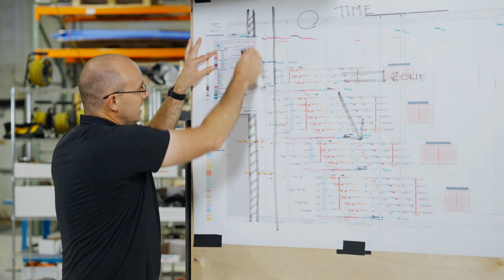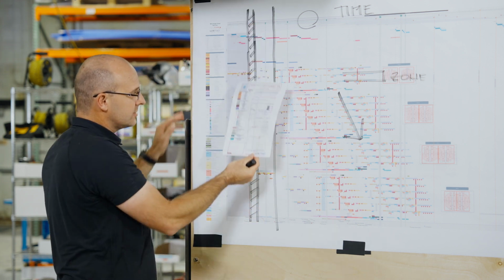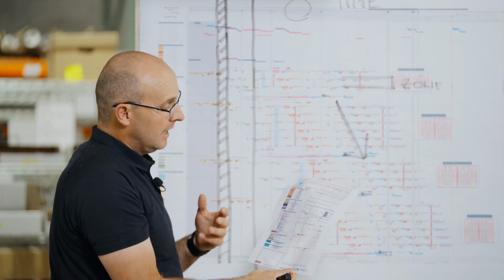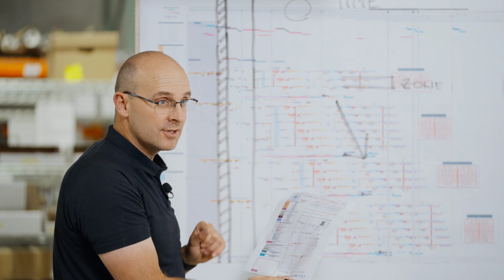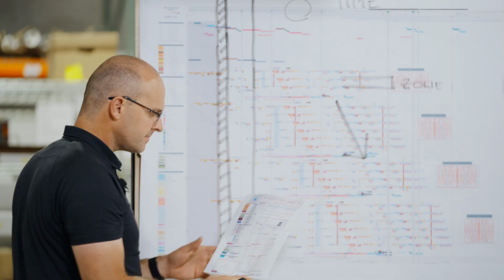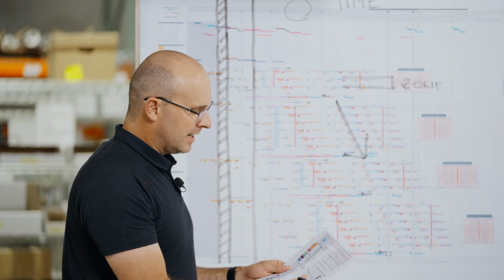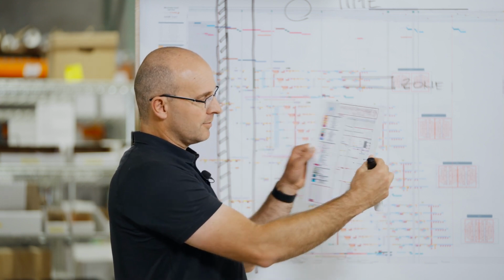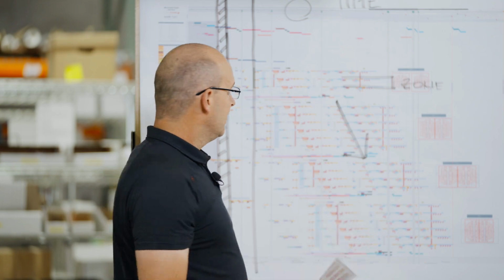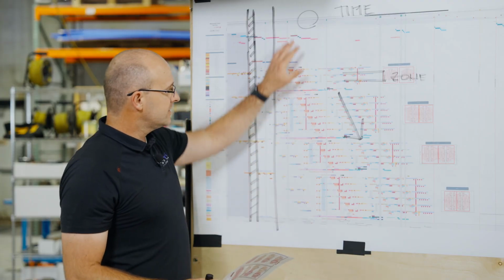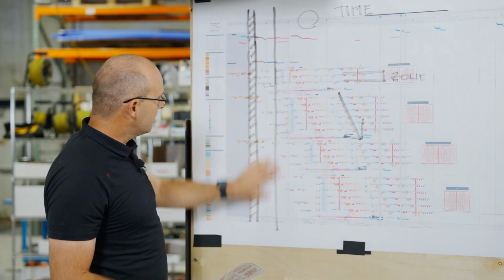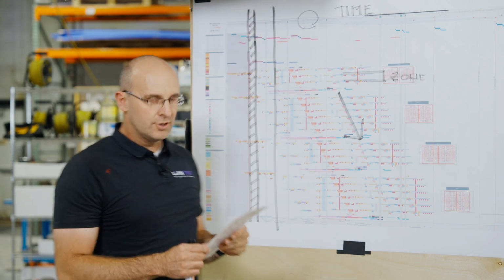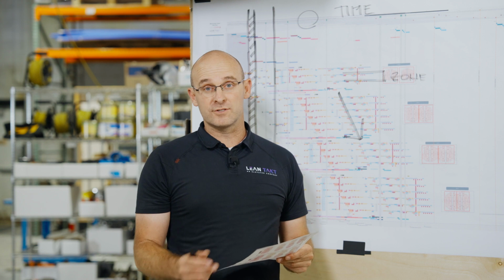And so this next week's snapshot gets pulled into these sheets, and this one actually shows a couple weeks by preference, but it at least needs to show the collaborated plan for next week. That collaborated plan makes its way onto your weekly work plan. And again, it shows the weekly work plan plus your zone maps. This is how you use them. If this is your long-term plan, you're making ready 6 weeks out, and you have your weekly work plan, you use this daily in the field for zone control.